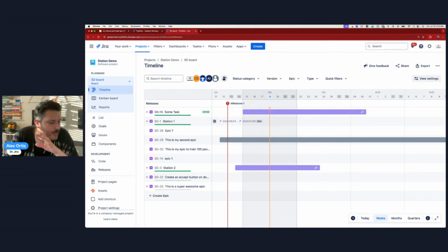My friends, if there's any takeaway that you get from this training, this is powerful because in your advanced roadmap, you can now set the priority, the order of operations of when the work must be executed by your team. You have the timeline, you have releases, you have your sprints. You can orchestrate the ultimate plan now because you have all the fields, you have dates, you have the blocks relationships, you have the priority, you have your milestones, so you know when those releases are going. You have the sprints, and you can set the order of everything, and you push those changes into Jira, and now your team, all they need to do is start with the item at the top and work their way down.